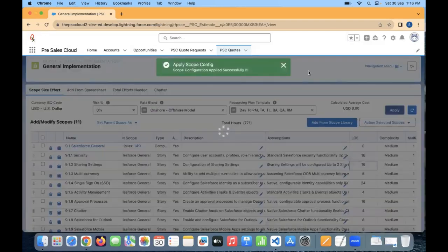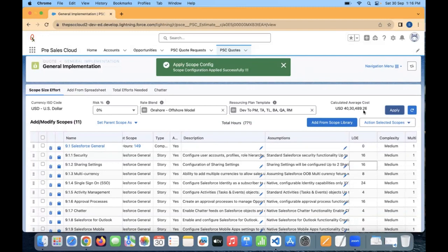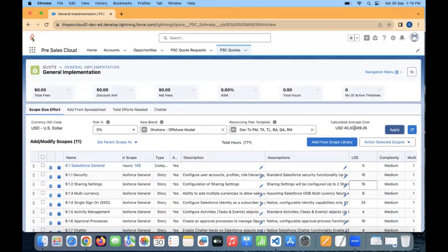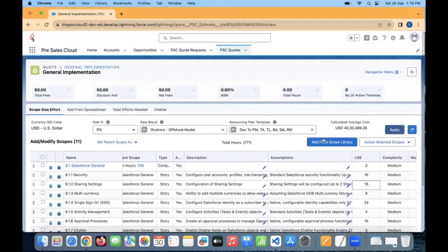Similarly, if you've asked how much this product is going to cost us, you'll see that the cost to us is basically 400K, I guess. This user locale is India, so it may show the USD in this format, but once we change the locale, it's around 400K. So what we could do is take some buffer, to 500K of implementation with the customer.